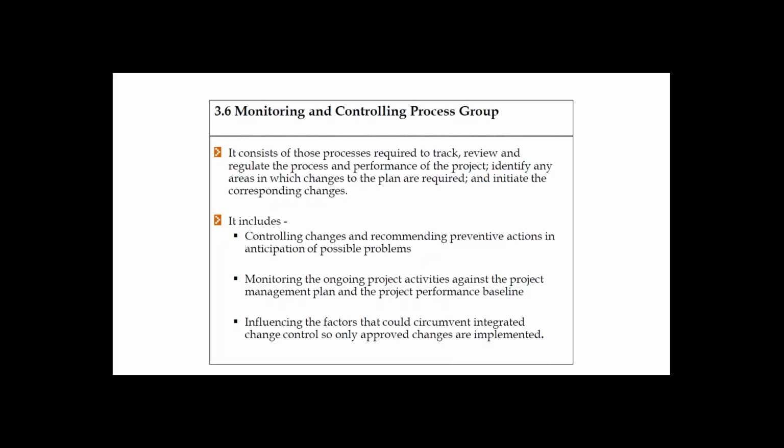Basically, whenever there are some changes, let's say I'm an important stakeholder and I would like to add an additional feature to the product, but we are already in the build phase. At that point, we cannot simply accept the additional feature request, but we need to take that point and see how the other constraints are impacted.